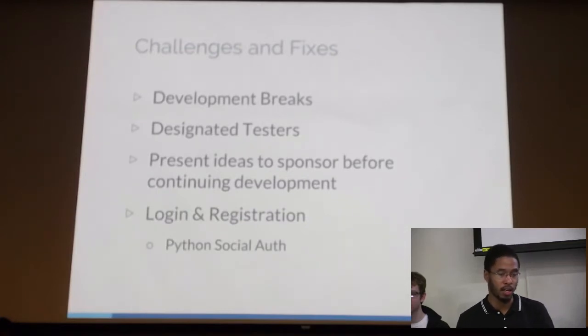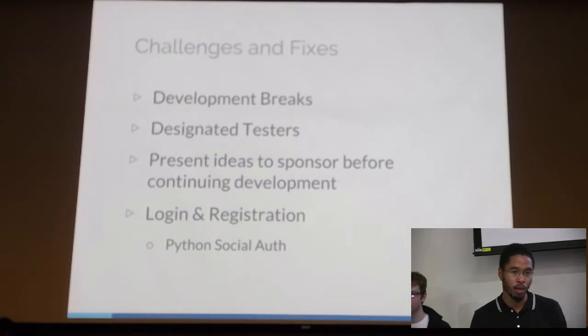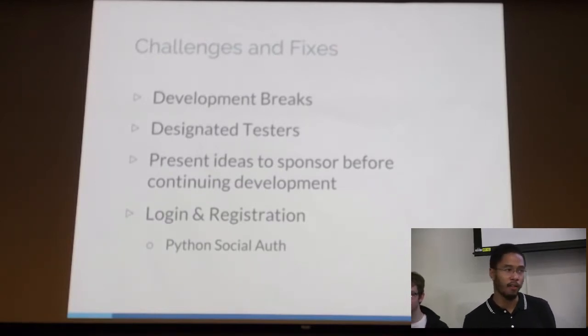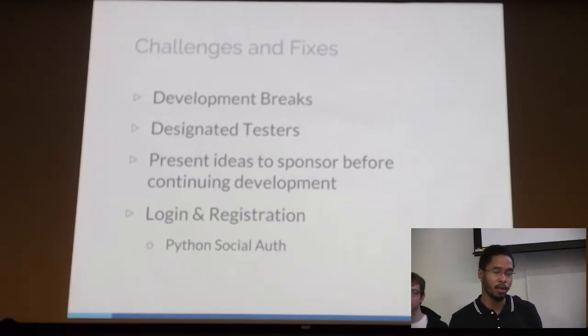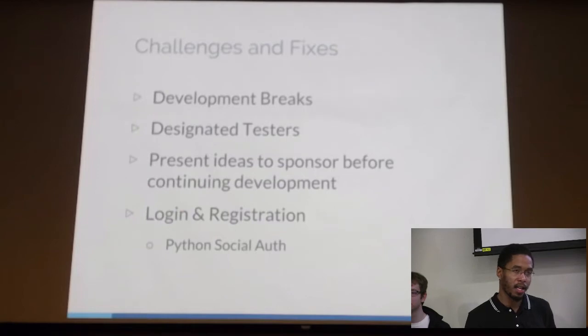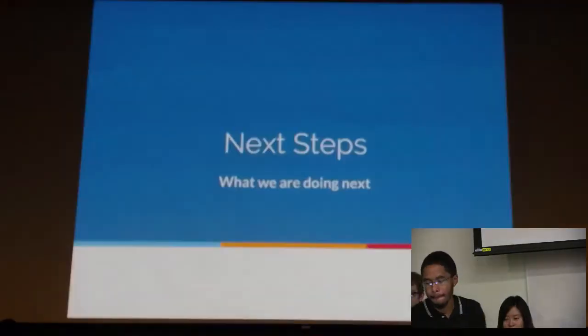Another really good idea that we felt we should do was, between iterations of our development, we would give the developers a 2 or 3 day break. We wanted to relieve the stress that we would put on our developers due to us all being students, all having other classes and assignments, and we wanted to make sure that we all had enough time to catch up on developments that we fell behind in, as well as to get an early start on the next iteration of the development.